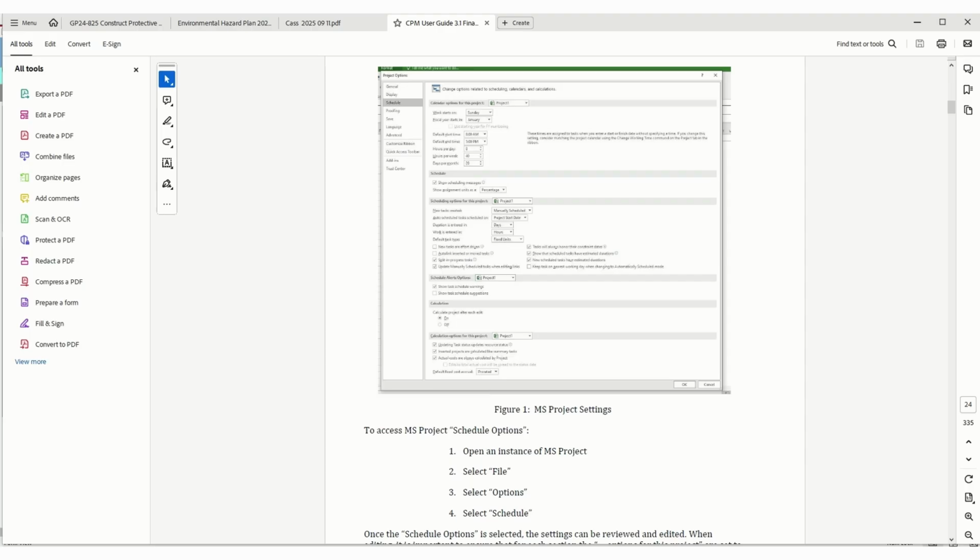We add it. We can say we need a quantity of 10. When do we need it by? Well, we need it by the start of the project or the start of this activity. And then you can save it from here. But then you can also say is it quoted, on order, received, issued, what date did it get on station, is it a long lead item, is it part of our 30, 60, 90 requirements.